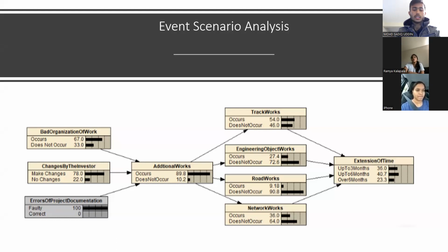in the above picture. In the event of a disaster, this event scenario simulation will instantaneously affect the whole network incident as well as the factors, and also numerous interactions will be explored since it was published. The authors will pick the impact, such as at a price of 36.0 percentage, the activation phase will be extended to 3 months. The implementation duration will be prolonged by 40.7% from 4 to 6th month. The implementation time frame will be stretched by 6 months with 23.3 percentage growth rate.